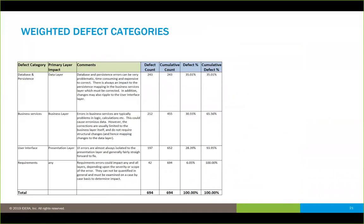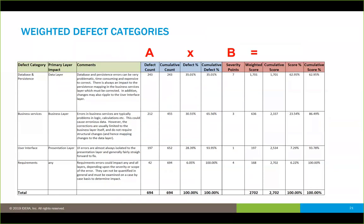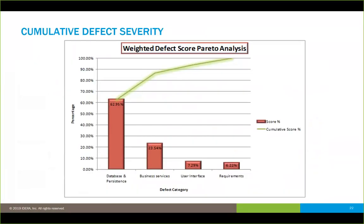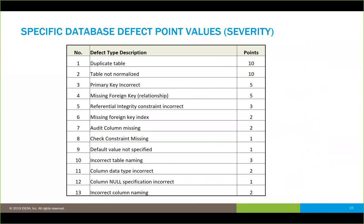We took those categories and looked at the actual defect count as well as the cumulative count to produce graphs. We also looked at different severities — arriving at a weighted score of the count of defects by the average severity points, to give a cumulative score. When we applied that weighted score, it brought our database and persistence category up to 63% of the problem, followed by business services, then UI, then requirements. Specific issues in the data included duplicate tables, non-normalized tables, incorrect primary keys, missing constraints, incorrect naming, and incorrect data types — all contributing to the problem.